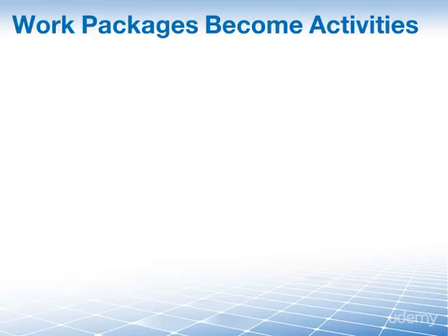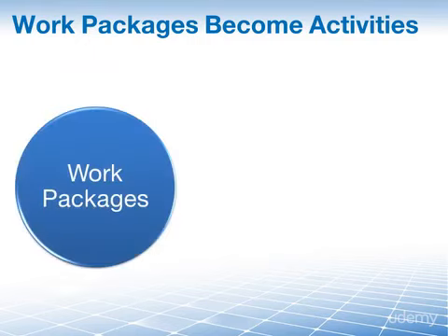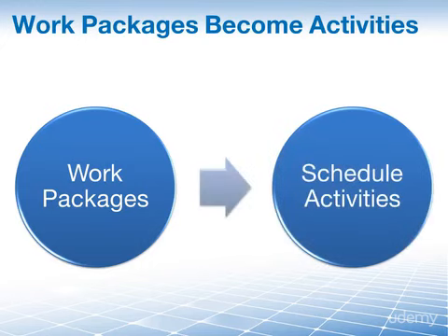So, as we have just learned, at the bottom of our WBS, we will find work packages, but even these work packages are then broken down even further. But this further breakdown does not happen here in the Create WBS process. We stop at the work packages. Instead, this breakdown happens in the processes of time management, to be precise, in the process of define activities. And there we decompose the work packages into schedule activities.